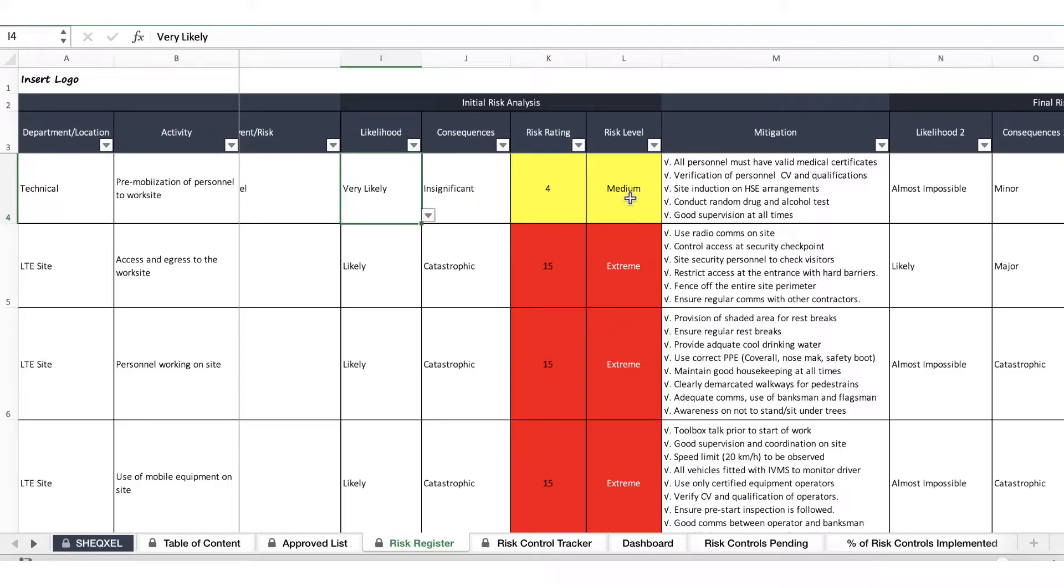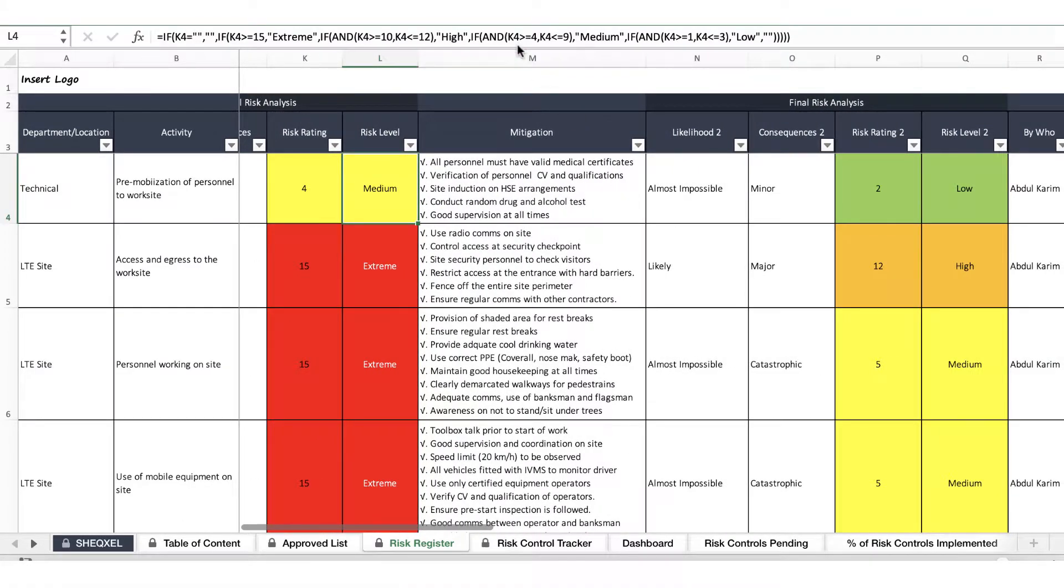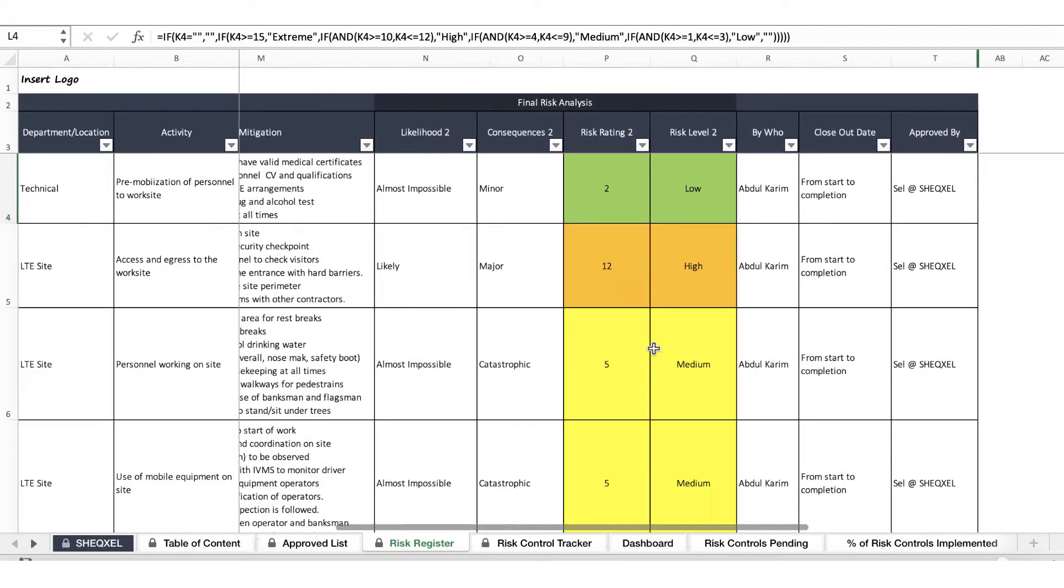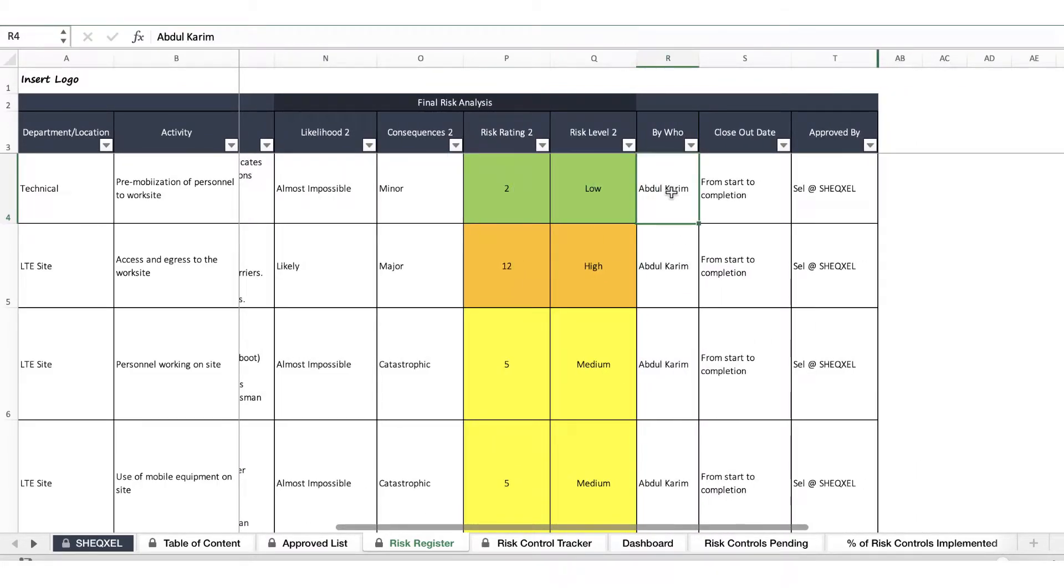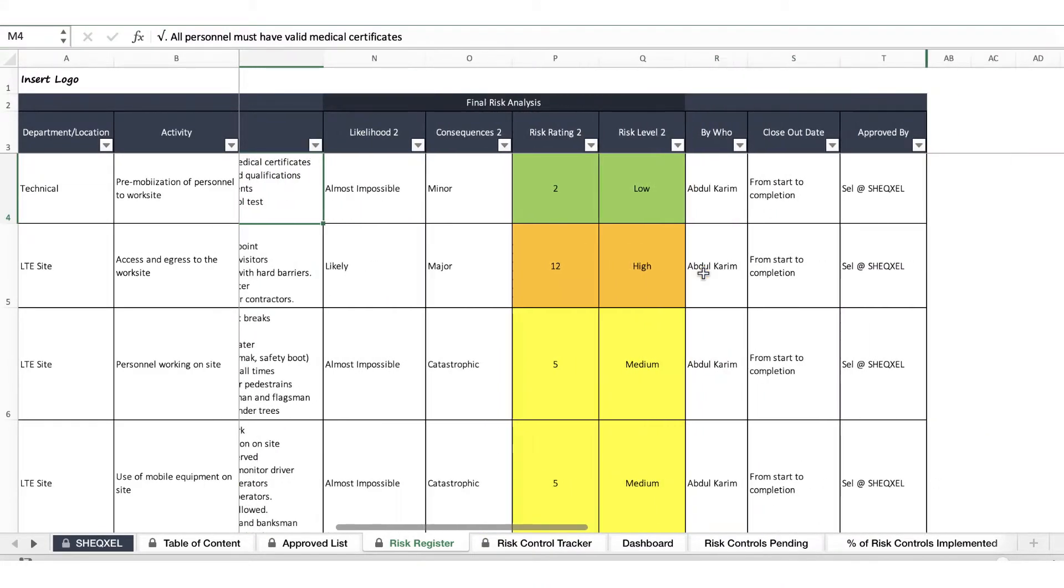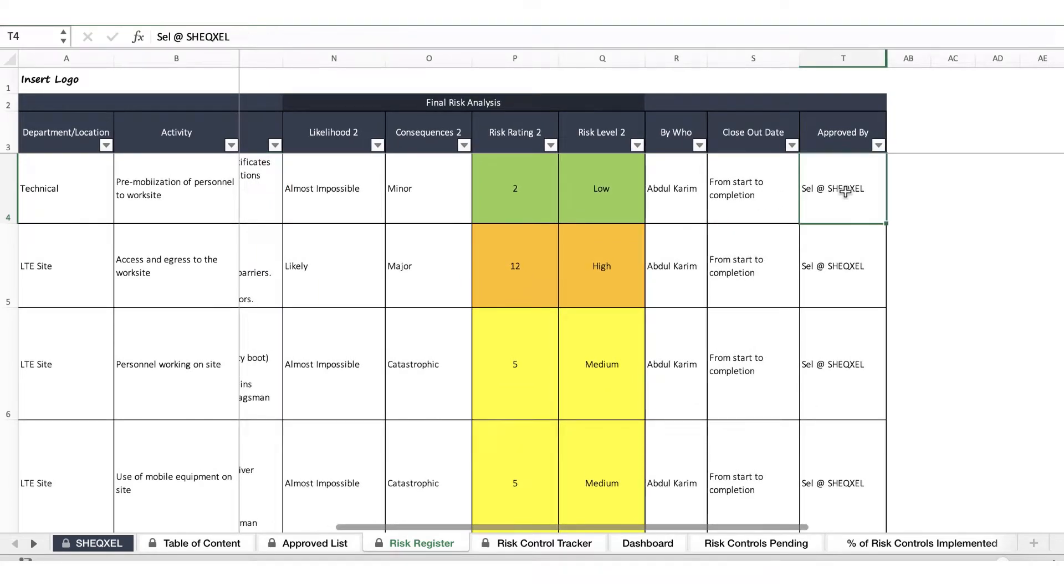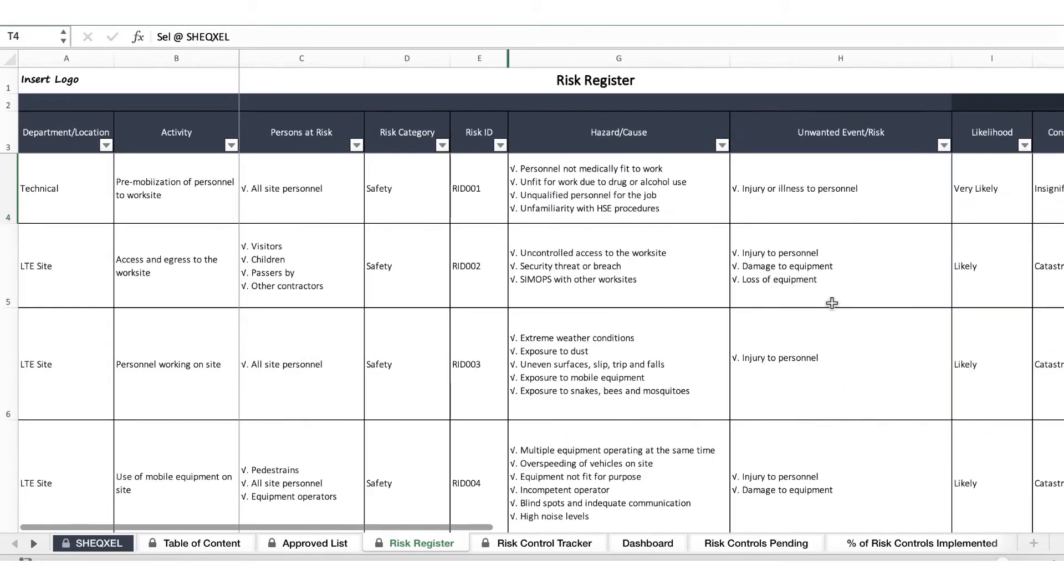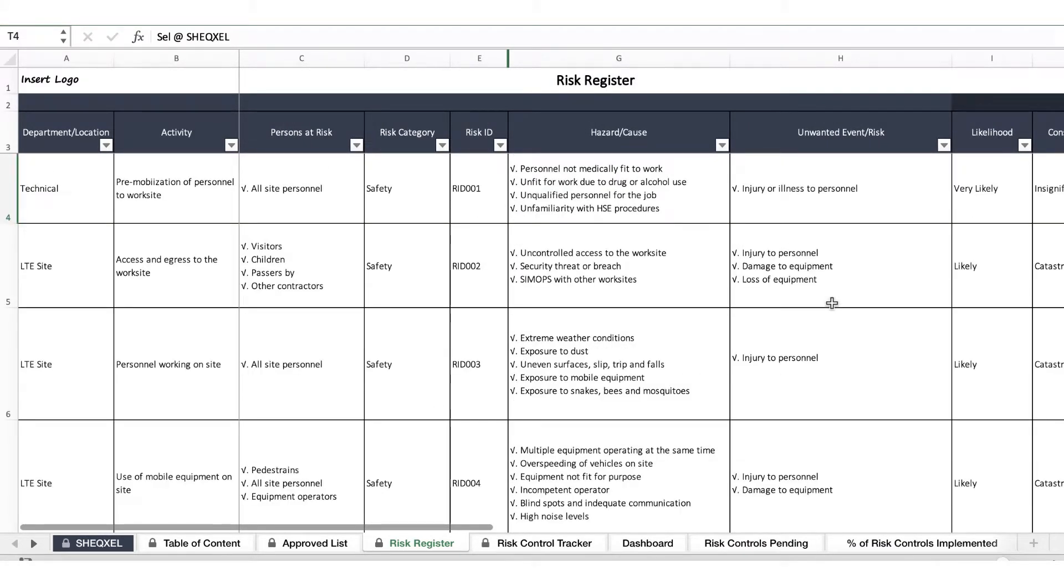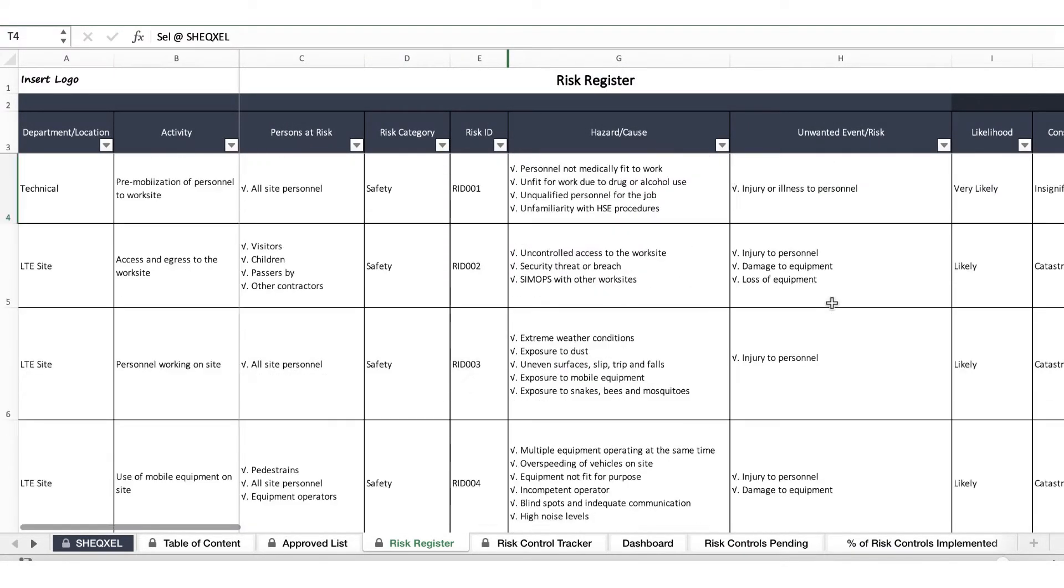You would identify the likelihood and the level of severity to estimate the risk rating which would provide the risk level. After that you implement your mitigations and you do a final risk assessment to further reduce the risk to a level that is as low as reasonably practicable. Then you provide who is responsible for these controls, a timeframe for implementation, and who has approved the risk assessment, often somebody in a higher authority like the safety manager or the MD.